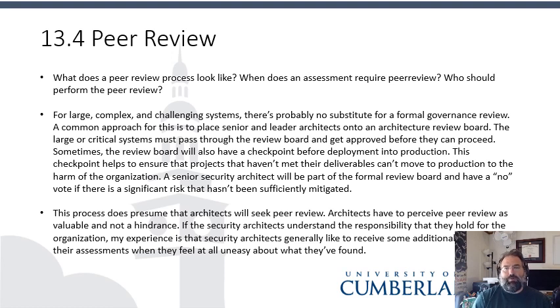What I've seen in most organizations is that the peer review process is a hurdle that must be gone over before you're actually able to deploy to production. You can do whatever up into proof of concept environments or even into quality assurance environments, but at the point you try to get to production, most of the time this is something that has to be done. And the reason that you can do it that way is that the people that do the deployment require it, and they won't let it go out without the review having been done.